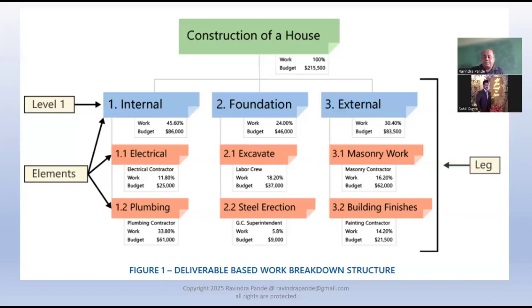Now, the beauty of work breakdown structures here: the responsibility lies with the project manager, but the say is with everybody, including analyst, designer, architect, even the team who is developing it. Would we do it parallelly? Do we have so many team members that we can do it parallelly, or do we have to wait for something to finish? Unless and until we complete our foundation, you can't go for either internal or external stuff. And normally, as you correctly said, we do the foundation, then the external, and then we start with the internal,